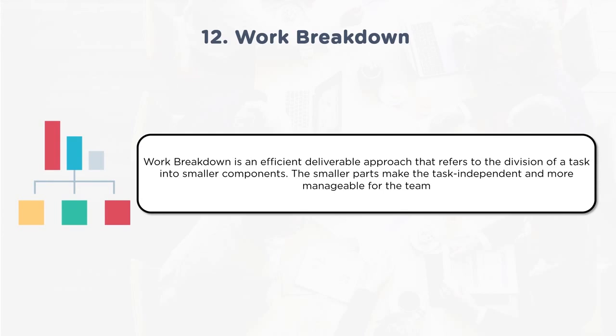Once I have the details, I will articulate what that particular work breakdown element, product breakdown element is. Then I will look at what skills and capabilities are required for that product, and I will assign the resources accordingly. Once activities and resources are assigned, automatically this will become a work breakdown structure.